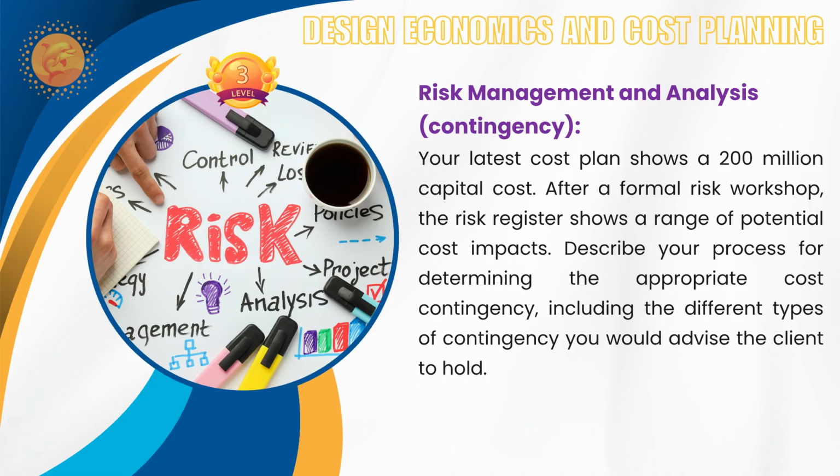So construction contractors contingency, that is different. That is usually included in your tender price. So those risk managed by the contractor. So unforeseen ground conditions, weather or authority requirement, those kind of risk transferred to the contractor. So they have to see how they are going to utilize that contingency allowances within their tender price. So this one for major risk like a scope change, economic risk or force majeure, this is still retained by the client, and you have to give some sort of advice to maintain contingency allowance for this kind of risk.